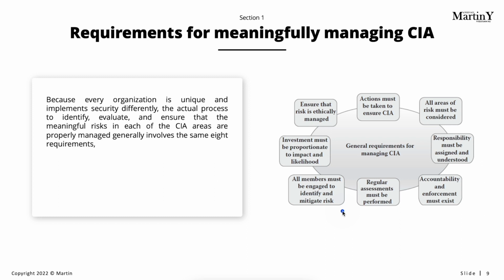And here we come to, in my opinion, the most important rule about risk management, and this is that the investment into risk management should always be appropriate to the impact that this risk could create. What I mean by this is, if you have a risk that could cost you $100 to fix, there is no point investing $200 to protect your organization from that risk, right?